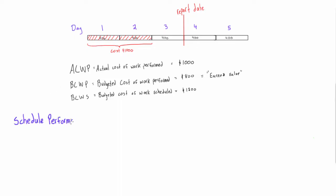First, we have the schedule performance index. It's a ratio of the performed work to the scheduled work. If we get an SPI that's greater than 1, then that's a good thing - the project is ahead of schedule.